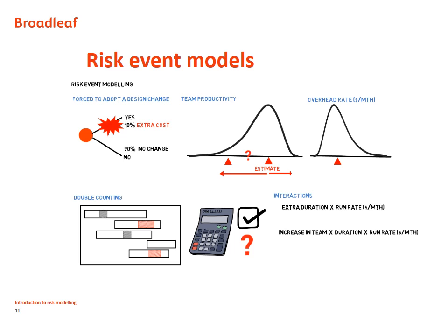However, if both risks affect the project, both of them happen, each one will change the parameters used to calculate the impact of the other one. Where there are several risks and lots of possible interactions, it's very difficult to work out what the net effect will be. Risk event-based models, often constructed on the project risk register, are awkward to use and they're often unrealistic.